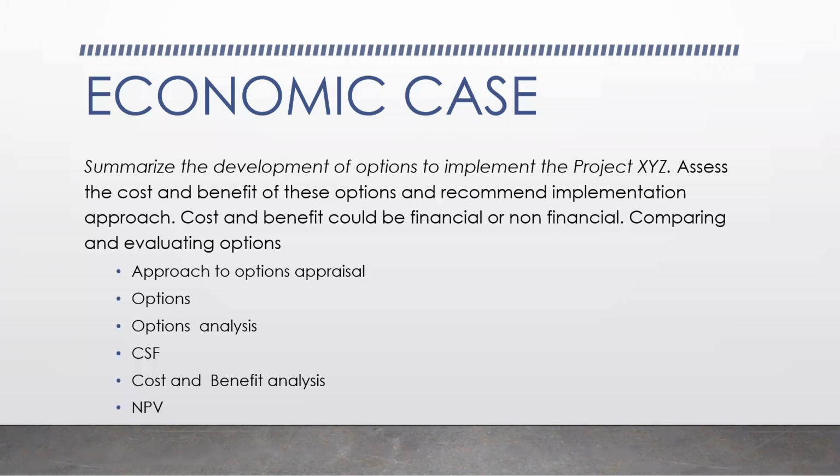You look at those different options. You have your solution. You probably want to have one or two. And there should always be a third option. And that option is, what if we do nothing? That option should always be there. Sometimes doing nothing is probably better for the business. So whatever solution you want to provide, even if it is only one option you have, compare that solution with actually doing nothing, if things stay the way they currently are. Look at the cost and benefits of both of them.